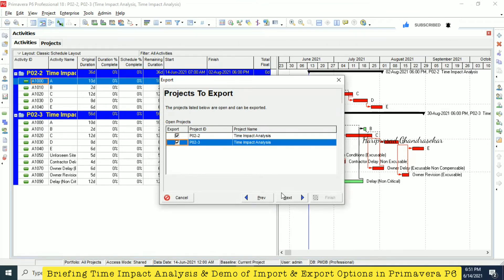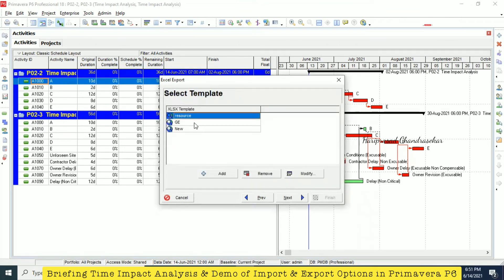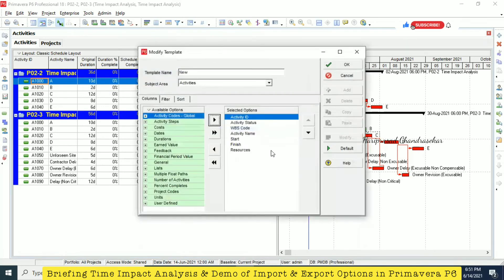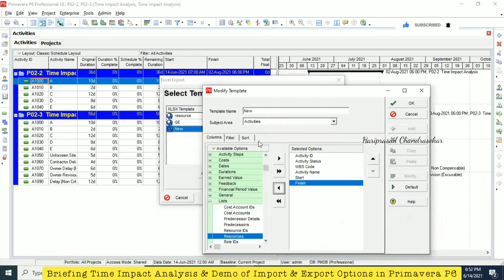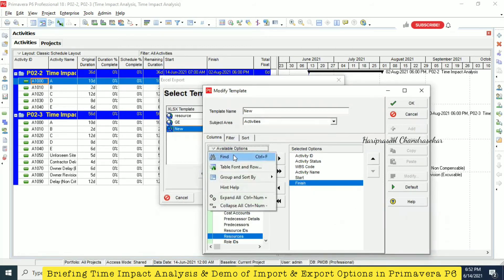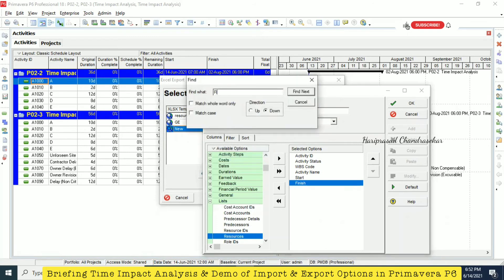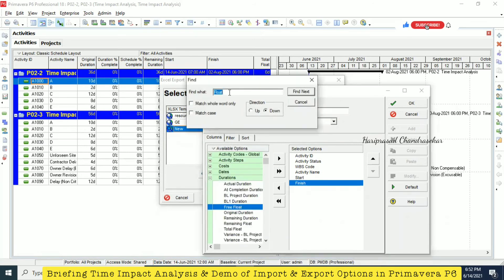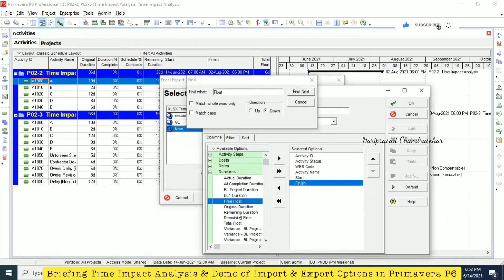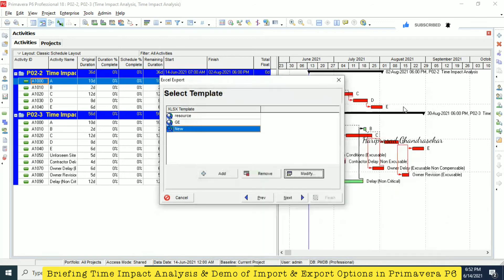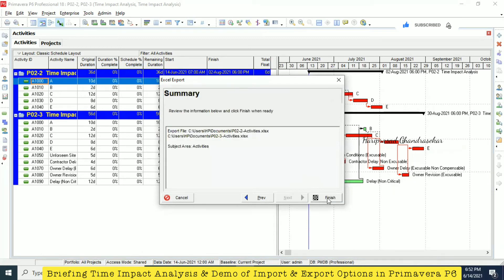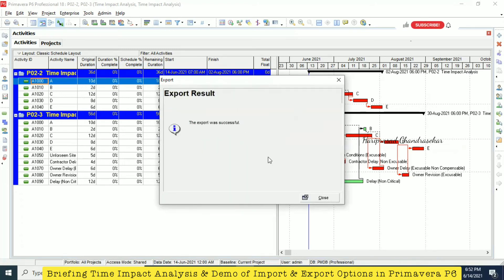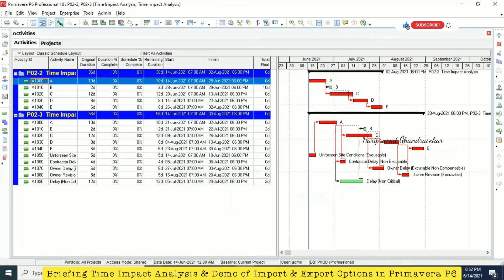I'm just going for both now. You can select the template, for example, the new one I just created, where I'm having these kinds of columns. If you want some other column like start, finish, notes, resource, I want float also. I'm selecting total float, then click okay. Now I'm going for next. We are choosing this template. It will be exported to Excel where we will have those informations we selected before. Review the information and click finish. The export was successful.